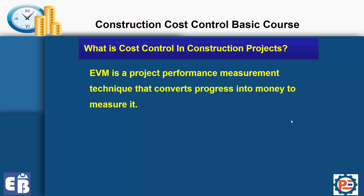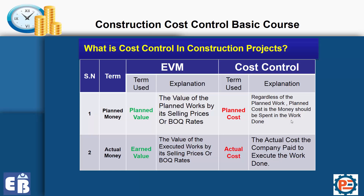Let's look at what cost control is versus what EVM is. When it comes to planned money, EVM uses the term planned value. The planned value is the value of planned works by its selling price or bill of quantity (BOQ) rates. So the planned value, which is commonly used in EVM, only focuses on the planned amount according to the selling price or BOQ rates.